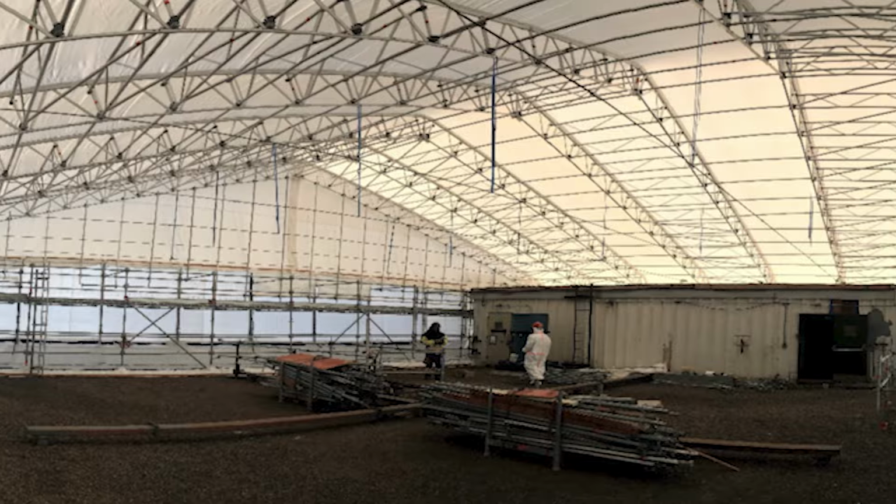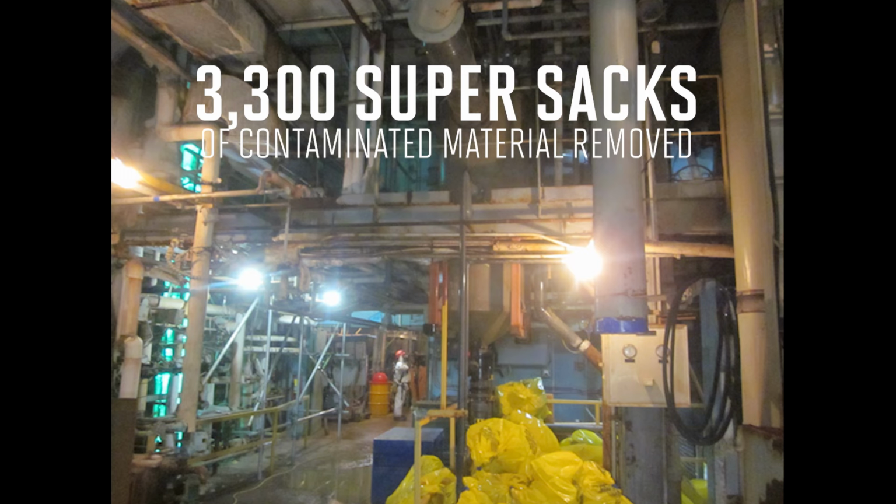We felt that we were in a position that we could safely bring in an outside contractor, which was Priestley, to successfully start deconstruction of the building and handle everything, sizing it to the requirements we needed to have it shipped and stored within the long-term waste management facility. Since the waste was going to the long-term waste management facility, every piece, every vessel, every pipe had to be split open. There could be no voids in anything that we sent. And it had to be cut to specific sizes. So there was processing that went on. We didn't just cut out big lines and throw them in bins.